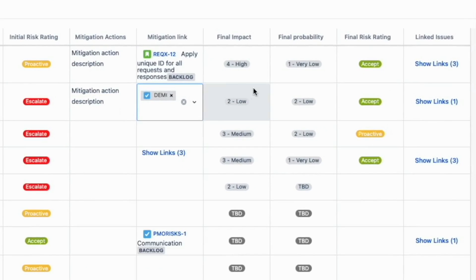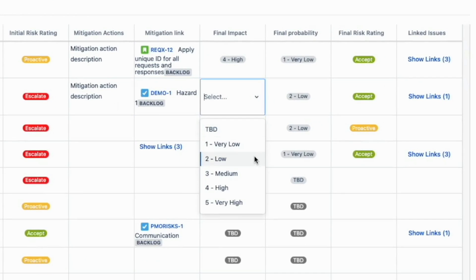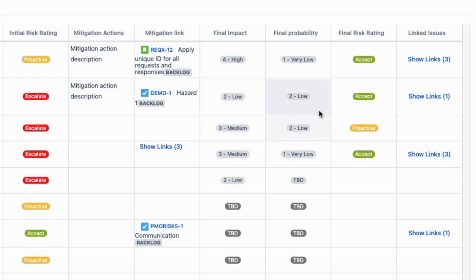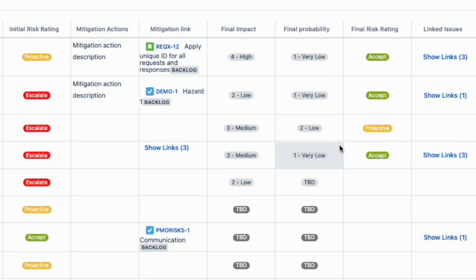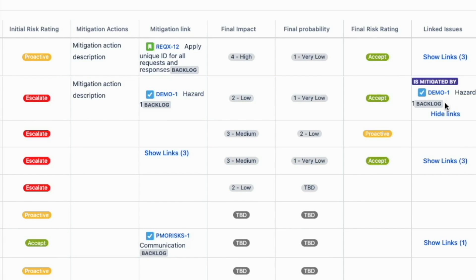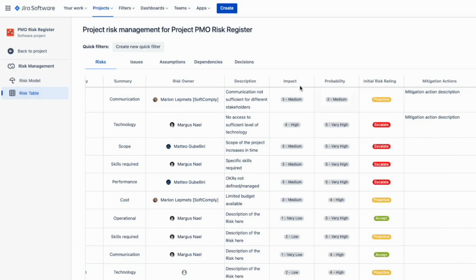When the mitigation actions are completed, you can assess the residual risk level. With Risk Manager Plus, you can add multiple risk assessment steps, like initial, current, and target. The last column is there to help you have an overview of all linked issues. You can fully customize the risk table by adding the columns that you need.